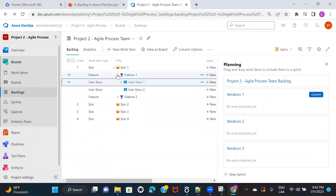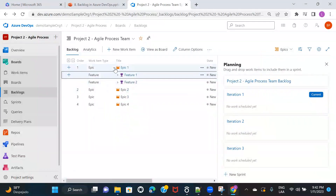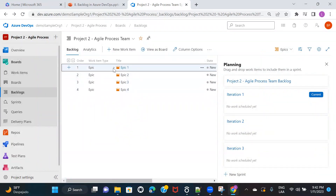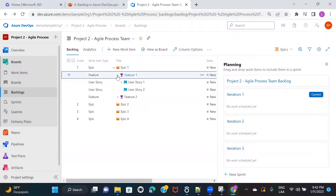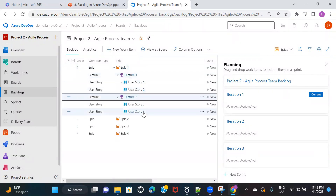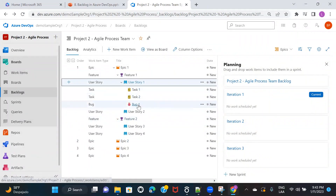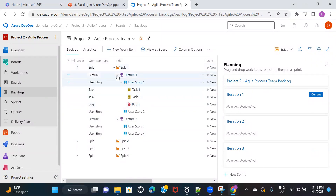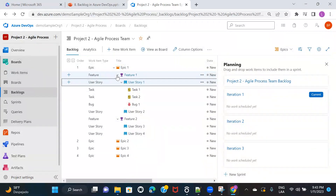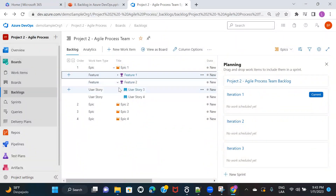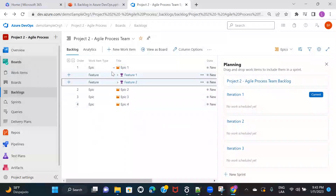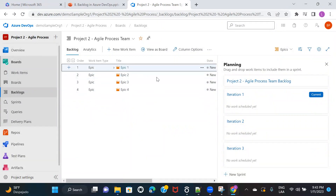So we have four epics. In Epic 1, we have two features. In Feature 1, I have two user stories. In Feature 2, I have two user stories. And in User Story 1, I have two tasks and one defect. This shows the full hierarchy — how everything is broken down to the most granular level. Now let's check out the details of each work item, starting with the epic.